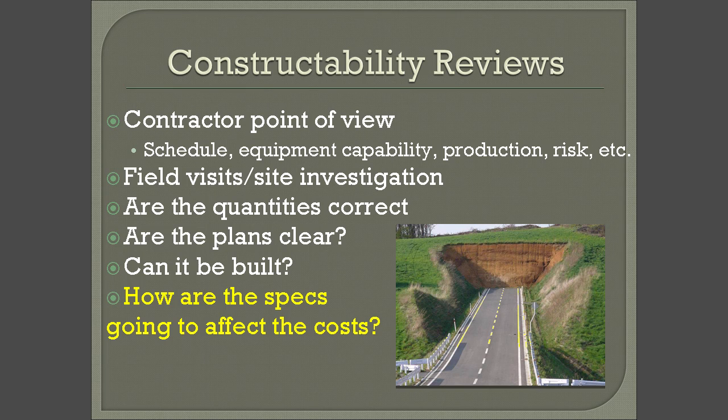What do you put in your spec? It's very important because that's what the contractor is looking at. That's your way of communication with the contractor. You're telling them, this is what I'm going to do, and this is what you can do. You cannot close the road from this time of the day to this time of the day. Make sure this is what you really want to do, because if it's not going to happen, you're going to end up with that wall.